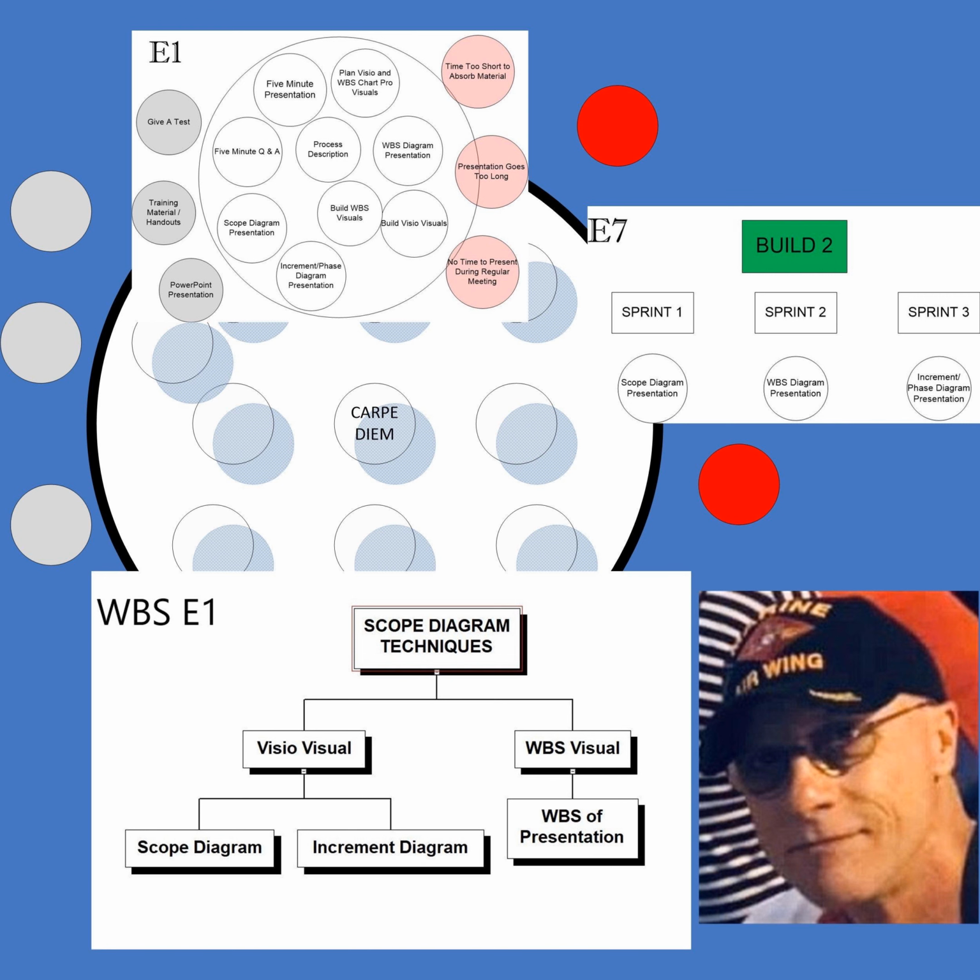Now, how did these bubbles get here? I copied all the bubbles from the scope diagram and moved them onto this new page, new tab in Visio, had them on the bottom, and then I started moving them up to where they belonged, or I thought they belonged.